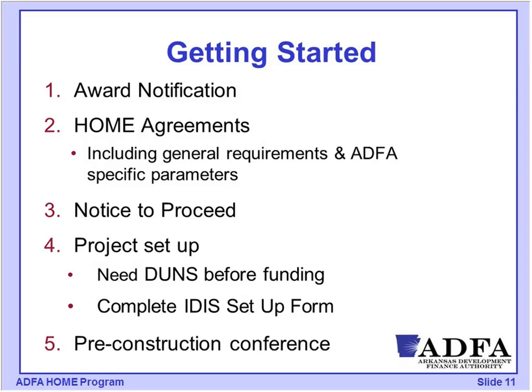Once the environmental review process has been completed and that release of funds has been received for that project, then the HOME agreement will be issued. We'll talk more about what's included in that HOME agreement. Basically, this is the document that lays out the terms and conditions for those funds that you receive. That includes the HOME regulations, the ADFA specific requirements, and other federal requirements that go along with that.